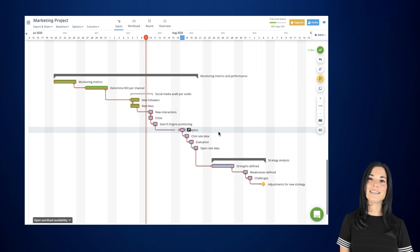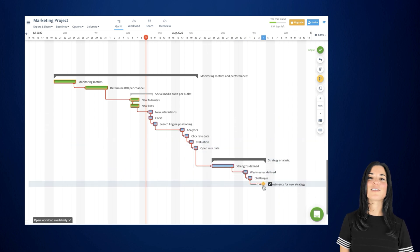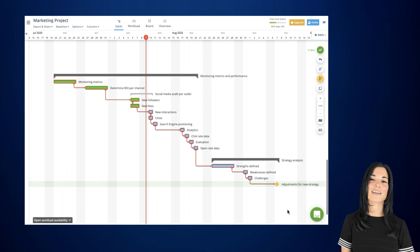Critical path analyzes the path that leads to the very last task of your project so that you can keep a closer look on those critical tasks that could potentially lead to a delay.